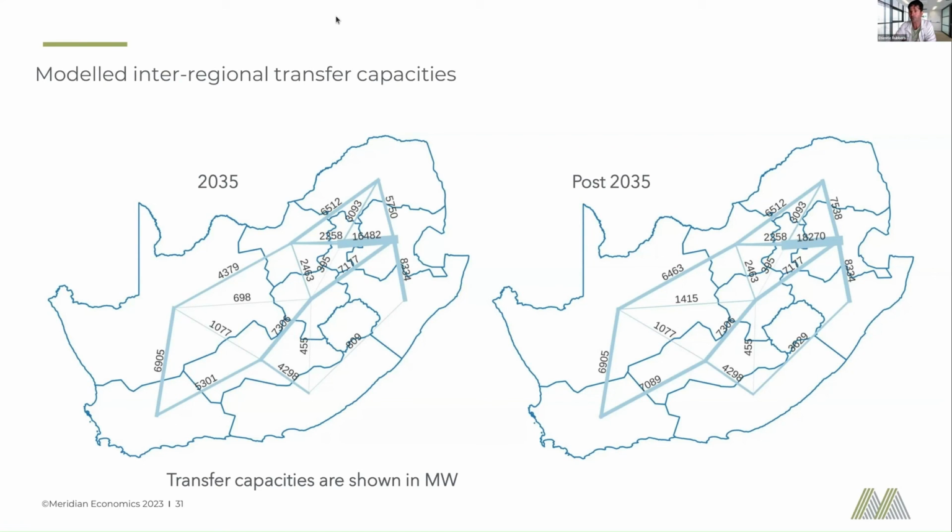With pump storage, it's more tricky in that you don't know what geological faults you're going to get until you start digging. There will be some things you didn't know were there. You see Snowy Mountain, and there's a whole host of projects which have failed. And like you say, they're mega projects, so it's just a recipe for corruption and state capture and all the other bad stuff.